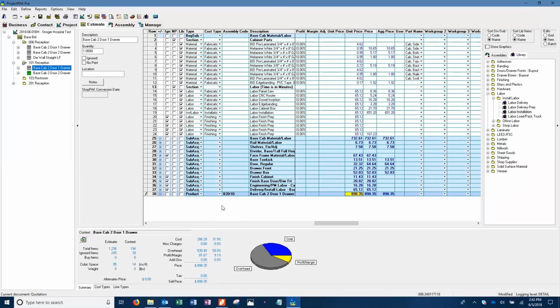Well, that's really great, and honestly, it's probably been working okay. But there was a reason you decided you wanted this, because ultimately, and I'm just assuming that you're very blown away by what Shop Pack will do, it will take the apples of Project Pack and turn them into the apples of Shop Pack, so you can compare. And it's great that we said it was going to cost this, but what did it really cost? Right. And the only way we really know that is to put POs against it and the labor. Right. So you'll just have to keep reminding us that that's why we do this. Okay.